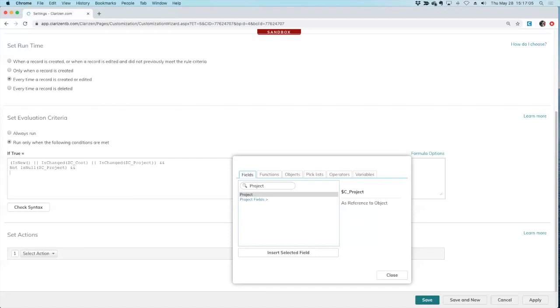And what else do we have? We have to make sure we have a date. These are time phase financials. So if I try to link a time phase financial and I don't have a time frame, I can't really do that. So I make sure that my field for date is definitely not null. And then finally, of course, I have to know which category I'm putting the cost into. So I have to make sure that my cost type is not null. Have to have a value in there.